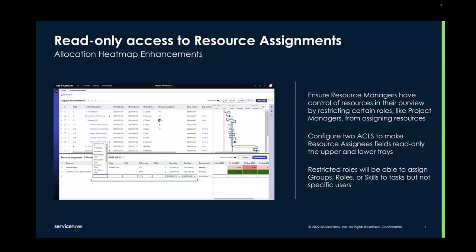Some organizations may only want resource managers to have access to named resources. It's now possible to configure ACLs to make assigning resources read-only for groups like project managers. The project managers will still be able to assign groups, roles, or skills to a task, but not to specific users. You can see in this screenshot that the resource name field is blank with only the ability to select a role type or a skill type.